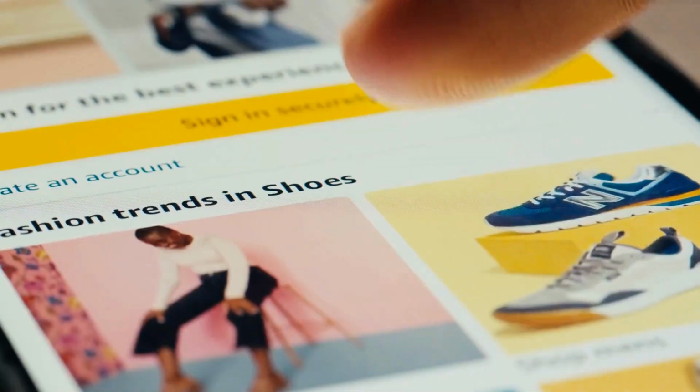So your client will come to you and in their defense, they think they're just making simple swaps. It's a bit like where they go shopping online and you can just click on some different options. But you as the designer know that interior design just doesn't work like that. So when you change one anchor piece, it can affect everything else. The colour palette, the scale relationships, the balance of textures and so on. So what started out as a 15-hour design project for you can become 45 hours of work, because essentially what you're doing is creating multiple complete schemes. And of course you're doing all of this extra work for free because in fairness, your contract did say "includes 2 revisions."